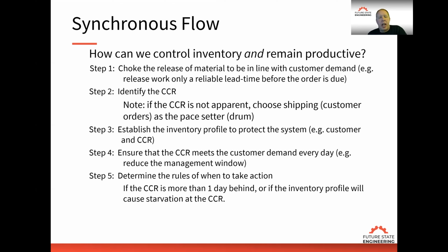Then the last step is to determine the rules when to take action. So if the CCR is more than 1 day behind, we need to take action to catch them up. That can be done through overtime, but before we spend any extra money, we want to say, are there other resources that can come and assist the capacity constraint resource to get back on schedule? That's really important when we talked about our employee skills matrix, to understand where we can pull resources to help improve flow through the capacity constraint resource.